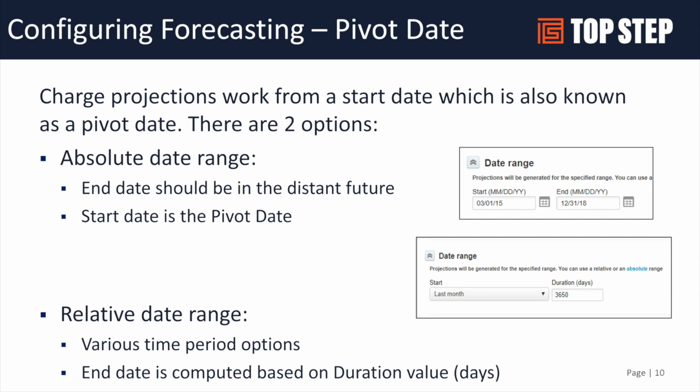That's an option. The problem with that option is that at some point the date range is going to need to be updated. If you're looking to run some sort of recurring time period forecasting, you have to manage those dates. So that's the downside of hard coding the dates on your forecast.